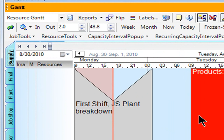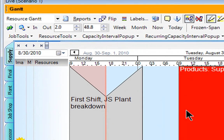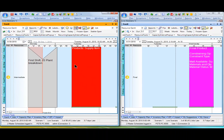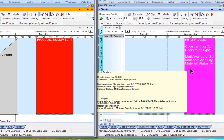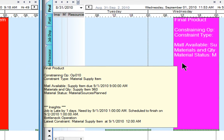What that capacity bottleneck in turn caused was the shift on my downstream plant, where I'm trying to produce this final product, but I'm not able to produce it in time. I get a lot more feedback about what the issues are: the constraining operation is the first operation, number 10. It's a material constraint affecting the availability of that item called supply item.